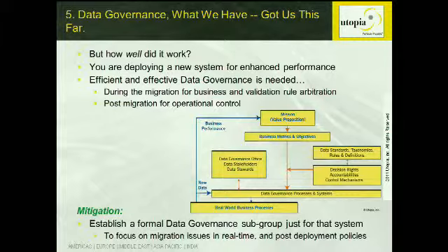And so when you're doing a large-scale systems migration into ECC, oftentimes people recognize the danger around the lack of a more formal and structured data governance program, and so they will form a data governance subcommittee or subgroup, at least just for the scope of that ECC or other systems migration. So the mitigation here for the data governance risk is establish a formal data governance subgroup just for that system,